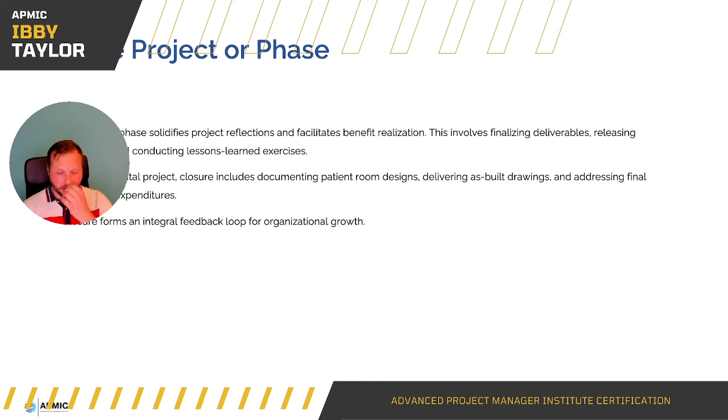So this involves finalising deliverables, releasing resources, and conducting lessons learned exercises. So for a hospital project, closure includes documenting patient room designs, delivering as-built drawings, and addressing final equipment expenditures. So it's wrapping everything up in a nice bow.